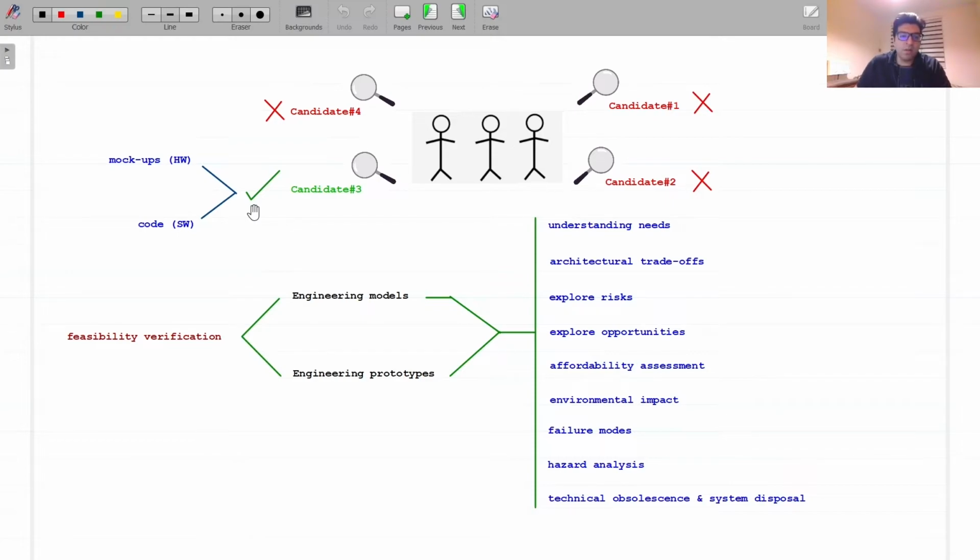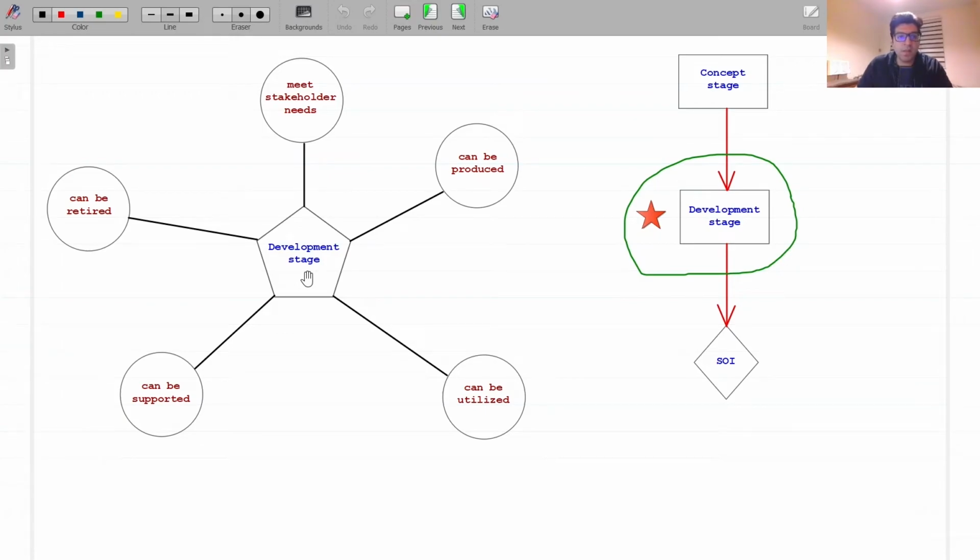Many projects are driven by eager project champions who want to get on with it. They succumb to the temptation to cut short the concept stage and they use exaggerated projections to support starting development without adequate understanding of the challenges involved. Many commissions reviewing failed systems after the fact have identified insufficient or superficial study in the concept stage as a root cause of failure.